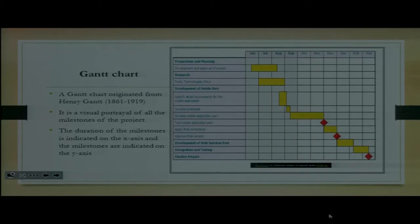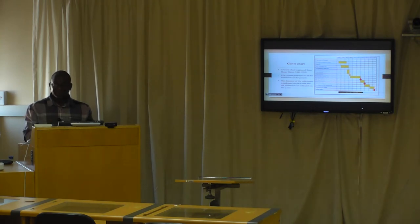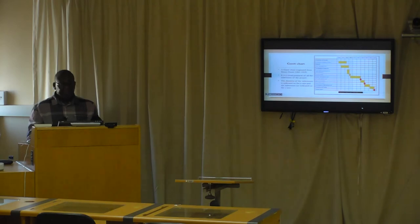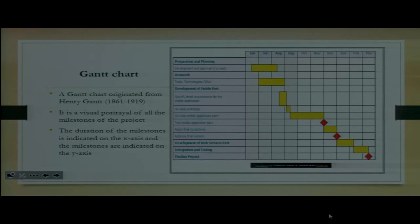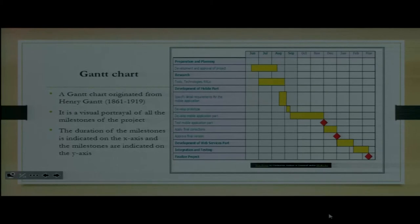I want to clarify: even though we talk about milestones, sometimes milestones and activities are used interchangeably, but we should refer to these as activities. Milestones would be those diamond figures you see on the Gantt chart — those are your checkpoints. For instance, a diamond figure might represent testing the mobile application to check whether everything is done the way it is supposed to be.